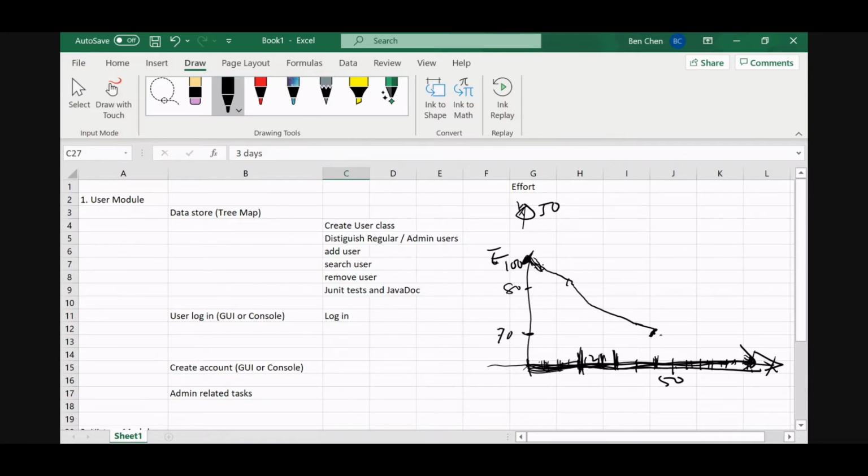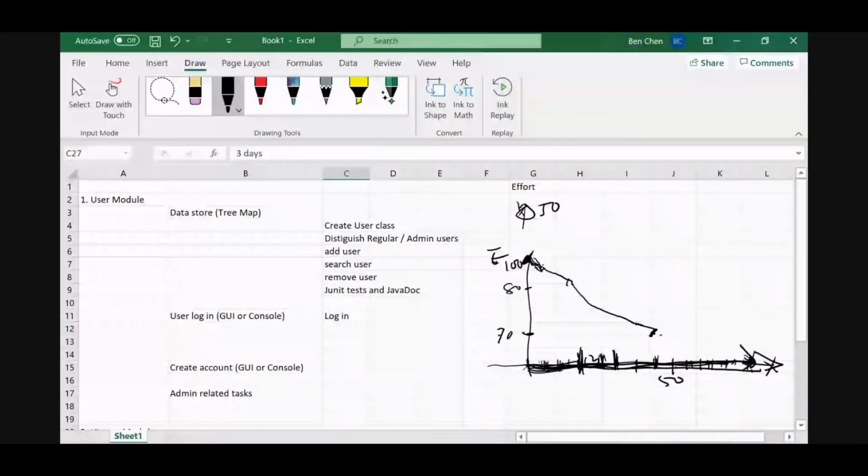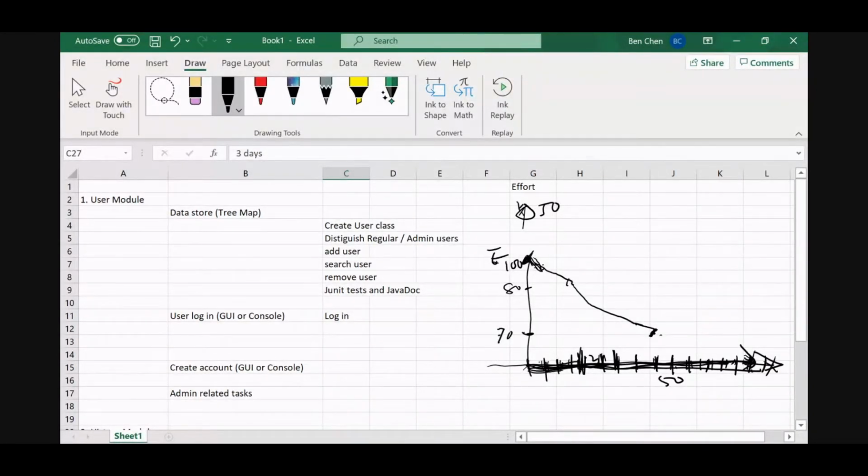50 segments. Okay. Now the word I was looking for is secondary. When you try to map your dates, dates are secondary. Okay, that means the 50 of this. And then you just map the secondary dates onto the hours. One day you may work 2 hours, that's fine. That will be November the 1st. Another day you may work 4 hours, that's fine. And this will be November the 2nd. Another day maybe 10 hours, that's fine. That's your November the 3rd.